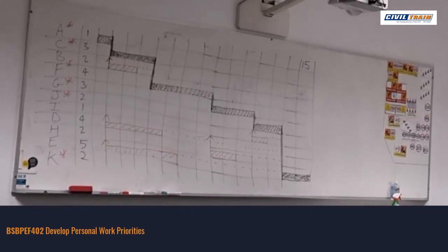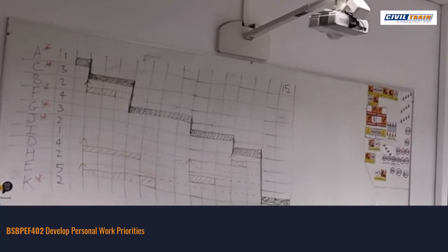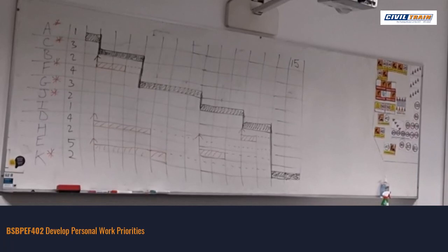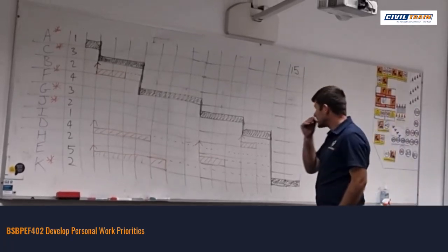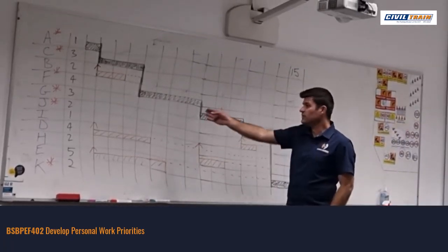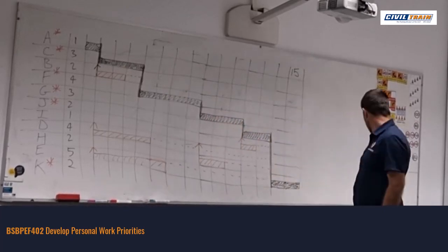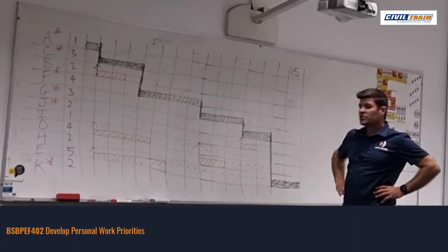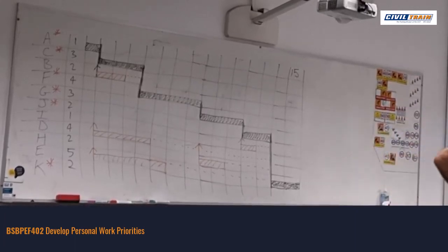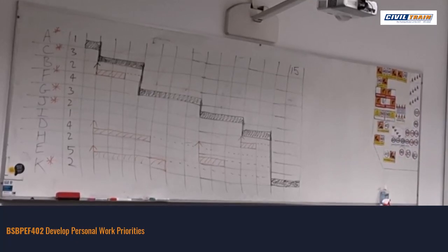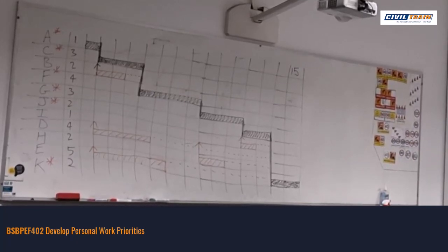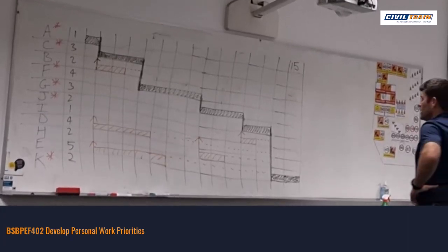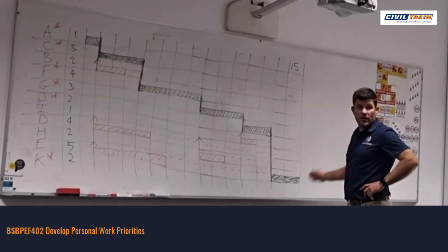So at the moment, this one's called unleveled. We've basically just got the critical path in there, and we have the floating tasks. We can still see where the dependency lines fit in, when they have to be completed. But it also shows us our opportunities there for those floating tasks. We can actually move them around if we had to, start them on different days. They're not going to technically initially affect the 15-day time frame unless they cross over that critical path.